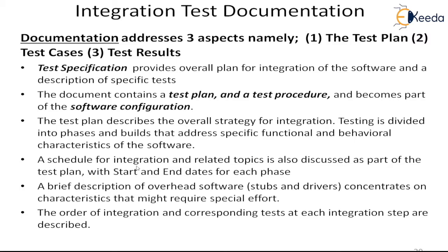A schedule of the integration and related topics is also part of the specification. That means in the test plan we need to have the start and end dates for each phase and any other constraints that have to be included. A brief description of the overhead software that we have to develop for that particular phase, the stubs and drivers, and how much effort we will require for it, is also part of the test plan. The order of the integration and corresponding tests at each integration step are described.